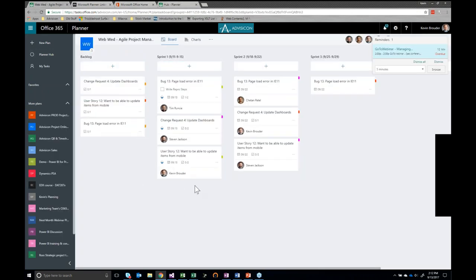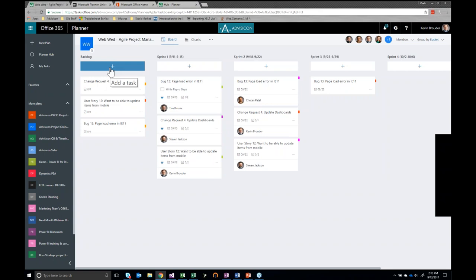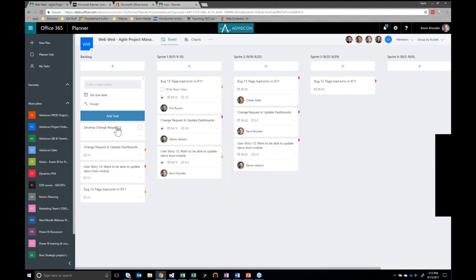Once you create a plan — I've already got one set up here — it will look something like this. You won't have any tasks, but you'll have a bucket. If you click on any of these buckets, you can rename them. You can see I've renamed my first bucket to 'backlog,' and then I've created several other buckets — I've filled in four sprints here, putting the timeframe of each sprint in the bucket name so it's quickly and easily identifiable. This board allows you to basically do everything you need to do in Planner. If you need to create a new task, just use the plus sign across any of the buckets and it will load a new task. You can give your task a name and click 'add task.'